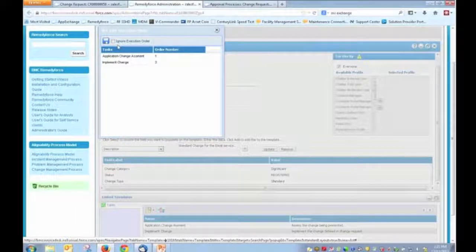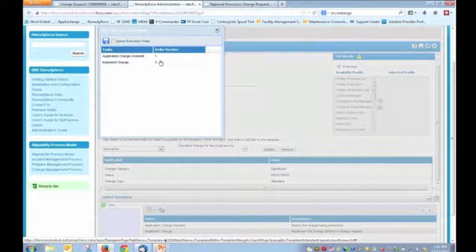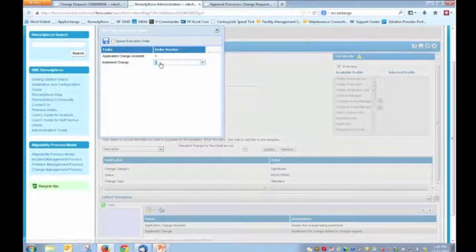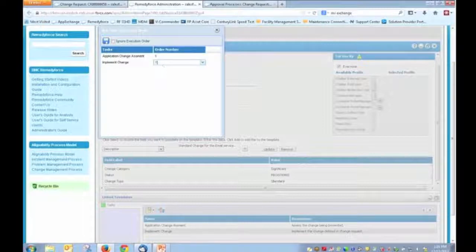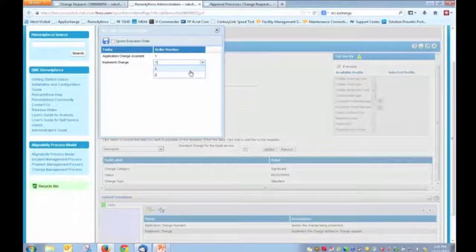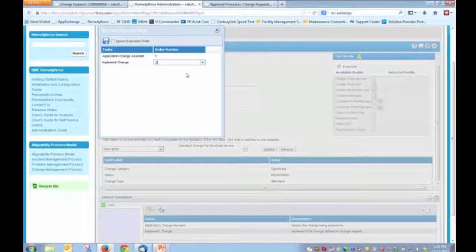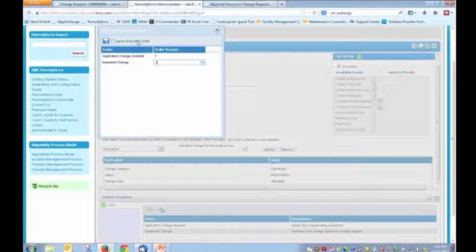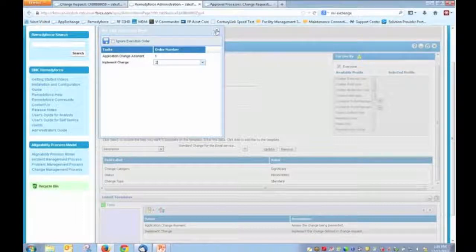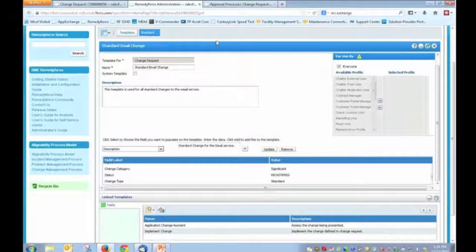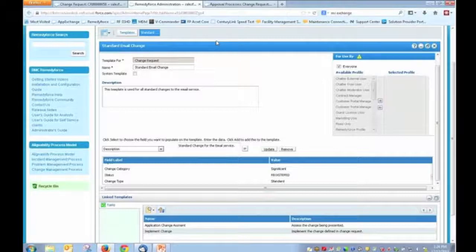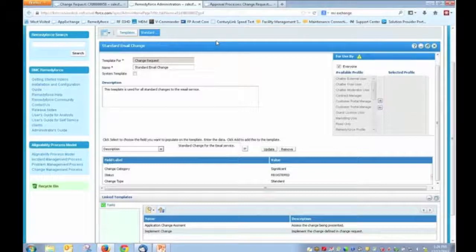Now, if there are situations where we have multiple tasks that need to be executed simultaneously, we can do that by giving them the same order number value for that given step. Now, this is probably not logical. If that was truly the case, we'd probably just ignore the execution order altogether and have all tasks distributed simultaneously. So again, I can't stress the value in the change templates or the templates module enough in the sense of driving consistency in terms of how you deliver your changes with the application.